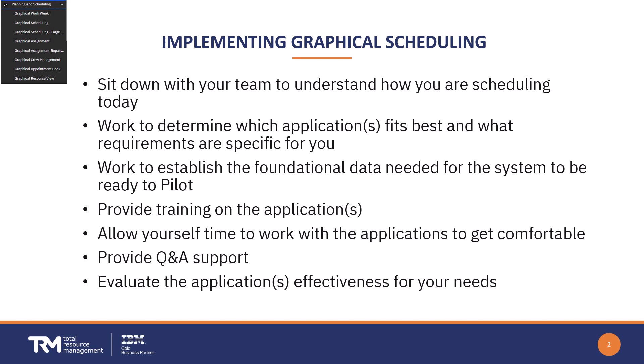You want to then work to clean up your foundational data — work orders with dates and durations, calendars, labor records, things like that — so that when you pilot the use of the applications, people will not be nearly as frustrated if they're working with not-so-great data. You need to spend a little bit of time cleaning up your data, not everything, but perhaps a focused set of work orders and such so that when you pilot the apps things go a little smoother.